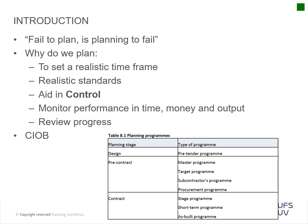In Table 8.2, note that there are different scheduling methods. You have your planning stage, design stage, pre-contract stage, and contract stage — so you have different scheduling methods at different stages. Currently for your task you're looking at your pre-tender or planning stage. The pre-contract stage is usually when you go out on contract and the contractor bases his contract on that schedule.